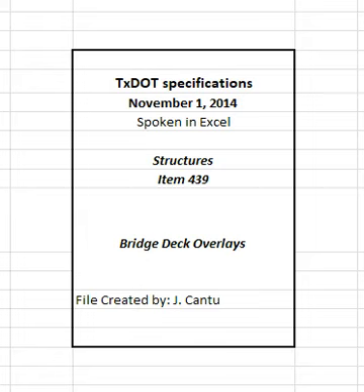Ensure the repaired surface is flush with the surrounding scarified surfaces. Allow the repair concrete to cure before placing the overlay concrete unless approved otherwise. When approved, placing repair concrete in partial depth deck repairs may be done concurrently when placing the overlay concrete.